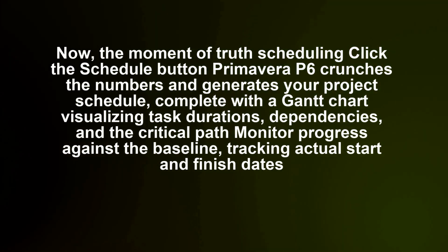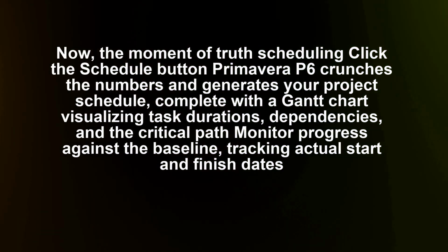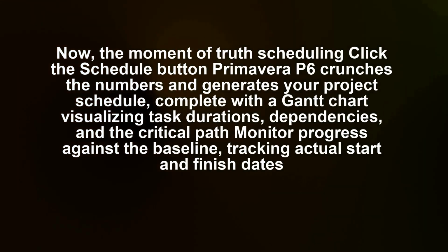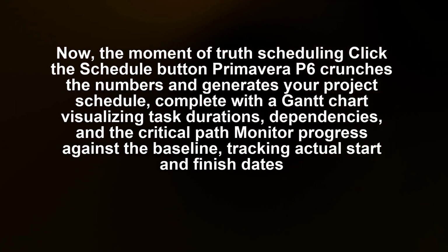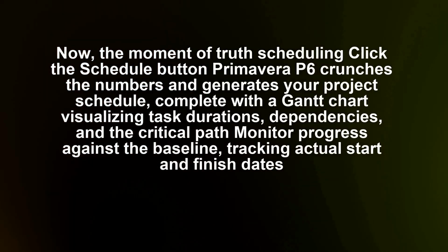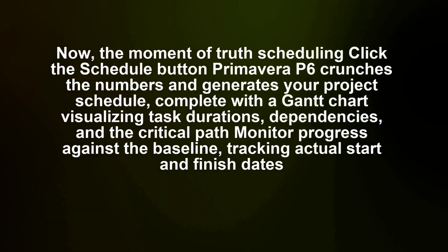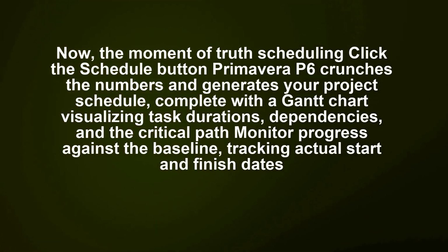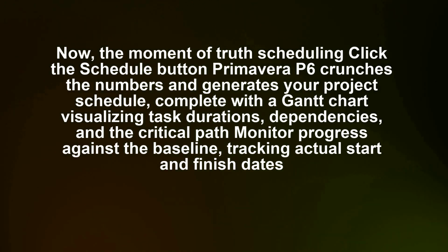Now, the moment of truth: scheduling. Click the Schedule button. Primavera P6 crunches the numbers and generates your project schedule, complete with a Gantt chart visualizing task durations, dependencies, and the critical path. Monitor progress against the baseline, tracking actual start and finish dates.